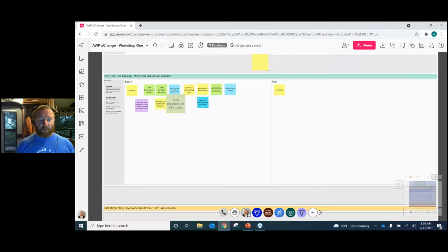For instance, you're going to need a construction manager anyway, but part of the AWP process is to get that construction manager to come in sooner. So we extended the cost of the construction manager, and that delta in cost was included. Workplace planners, the cost of workplace planners. So we looked at the cost of the various people needed to do it.